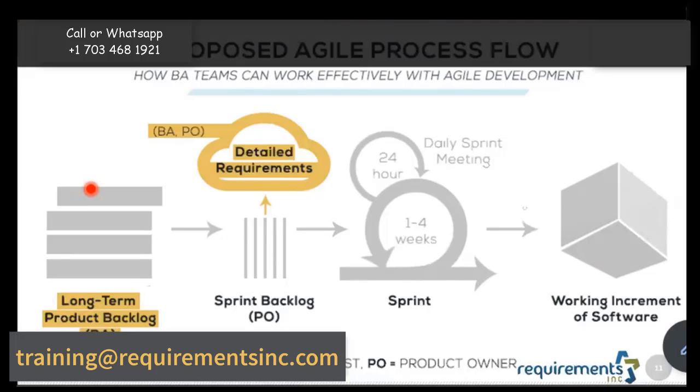Now, the other important ceremony here at this point, when you're almost done, is taking a step back, taking a look back at the 2 week period and say, okay, how did we do in this sprint as a team? And this is for the Scrum team itself. And a Scrum team is usually 7 plus or minus 2 members. So it's about 5 to 9 people is the optimal recommendation. So your Scrum team gathers internally. This is not a customer meeting. This is not a manager kind of bossing around and asking you why this wasn't done or whatever. This is the team by itself. That's why Scrum is called a self-governing team.